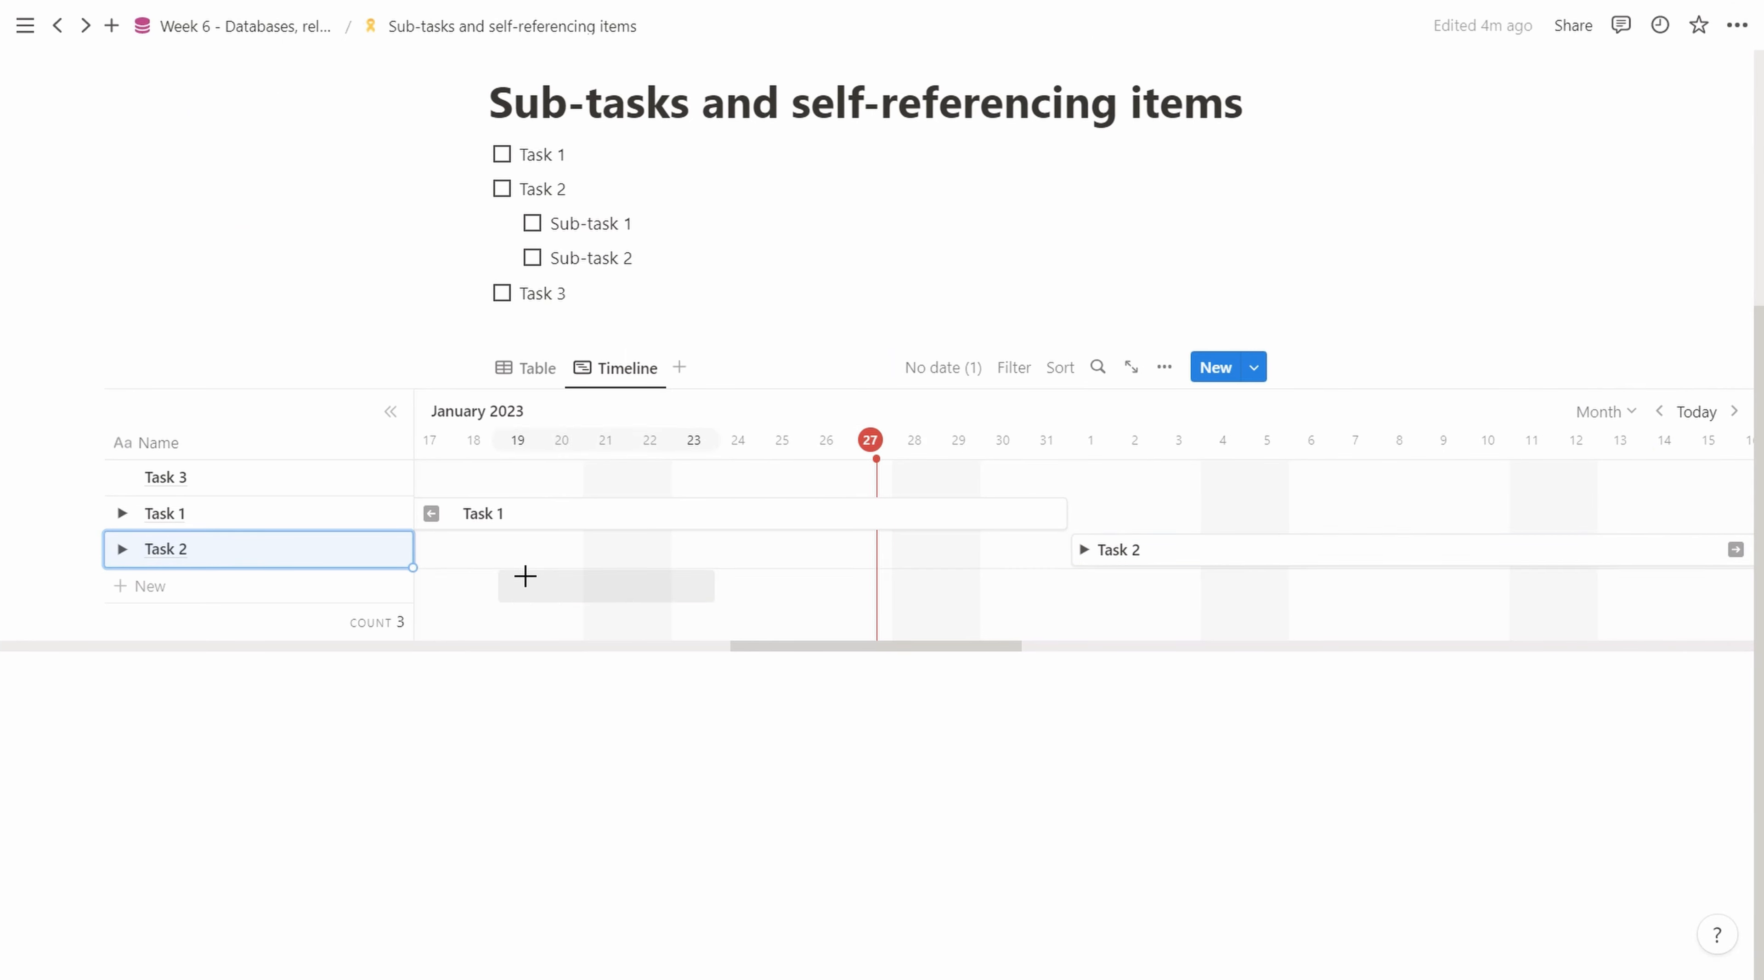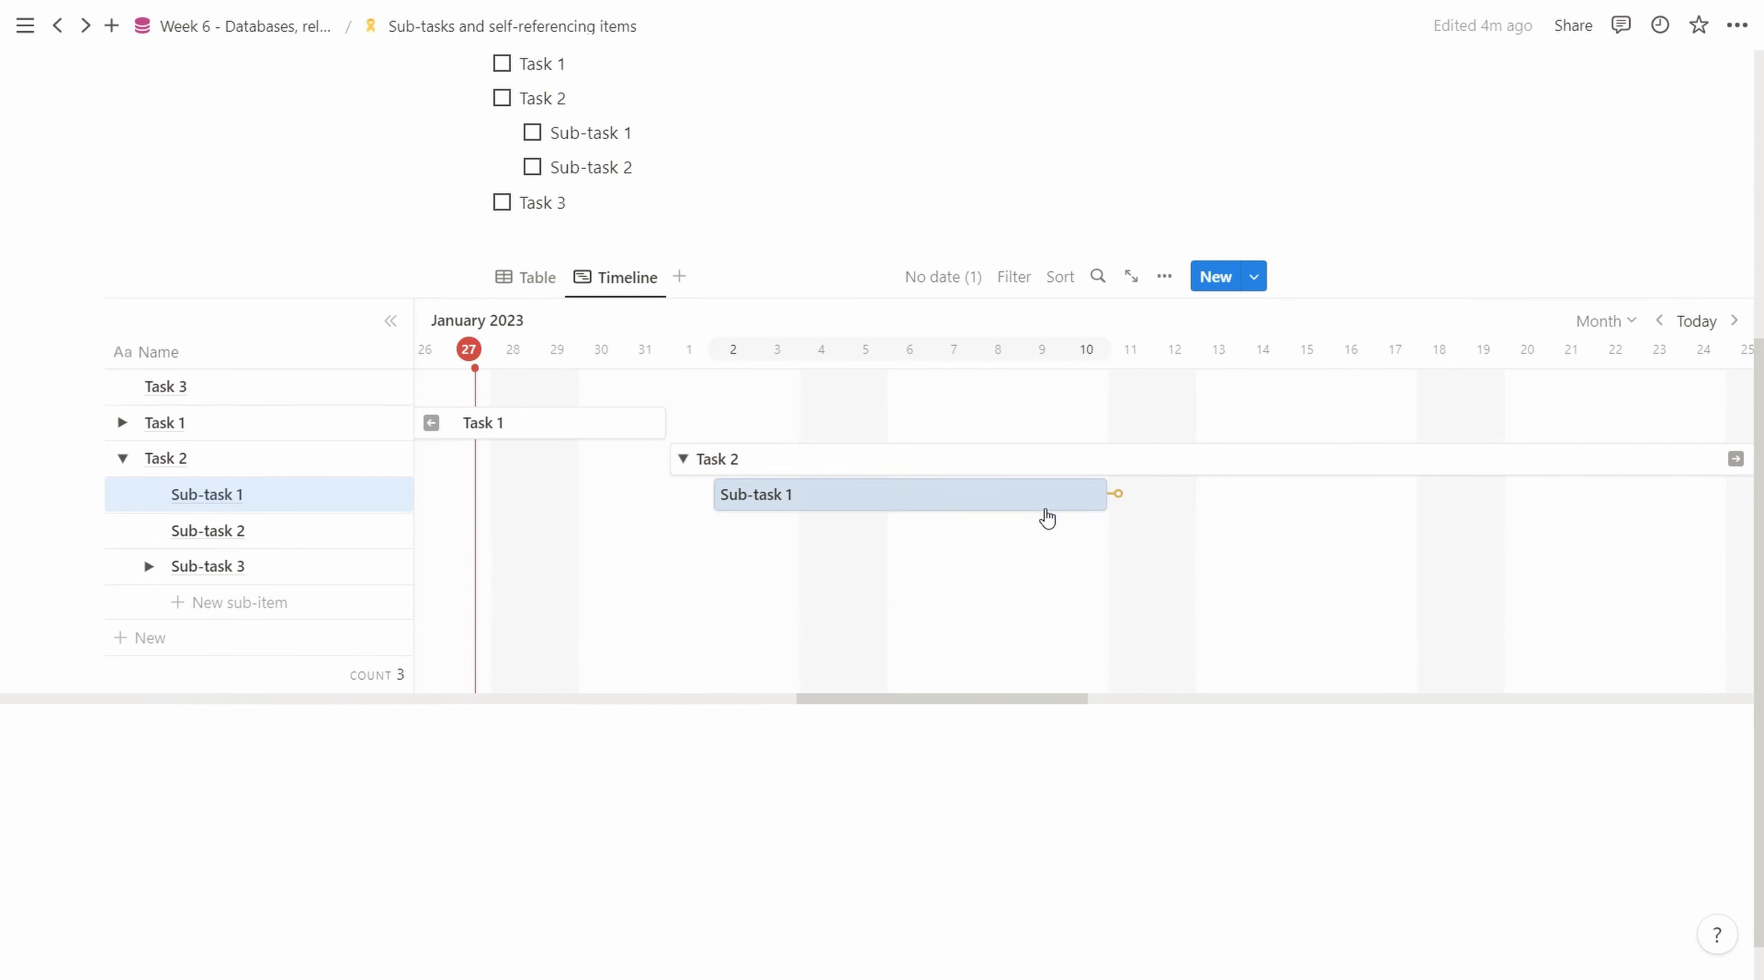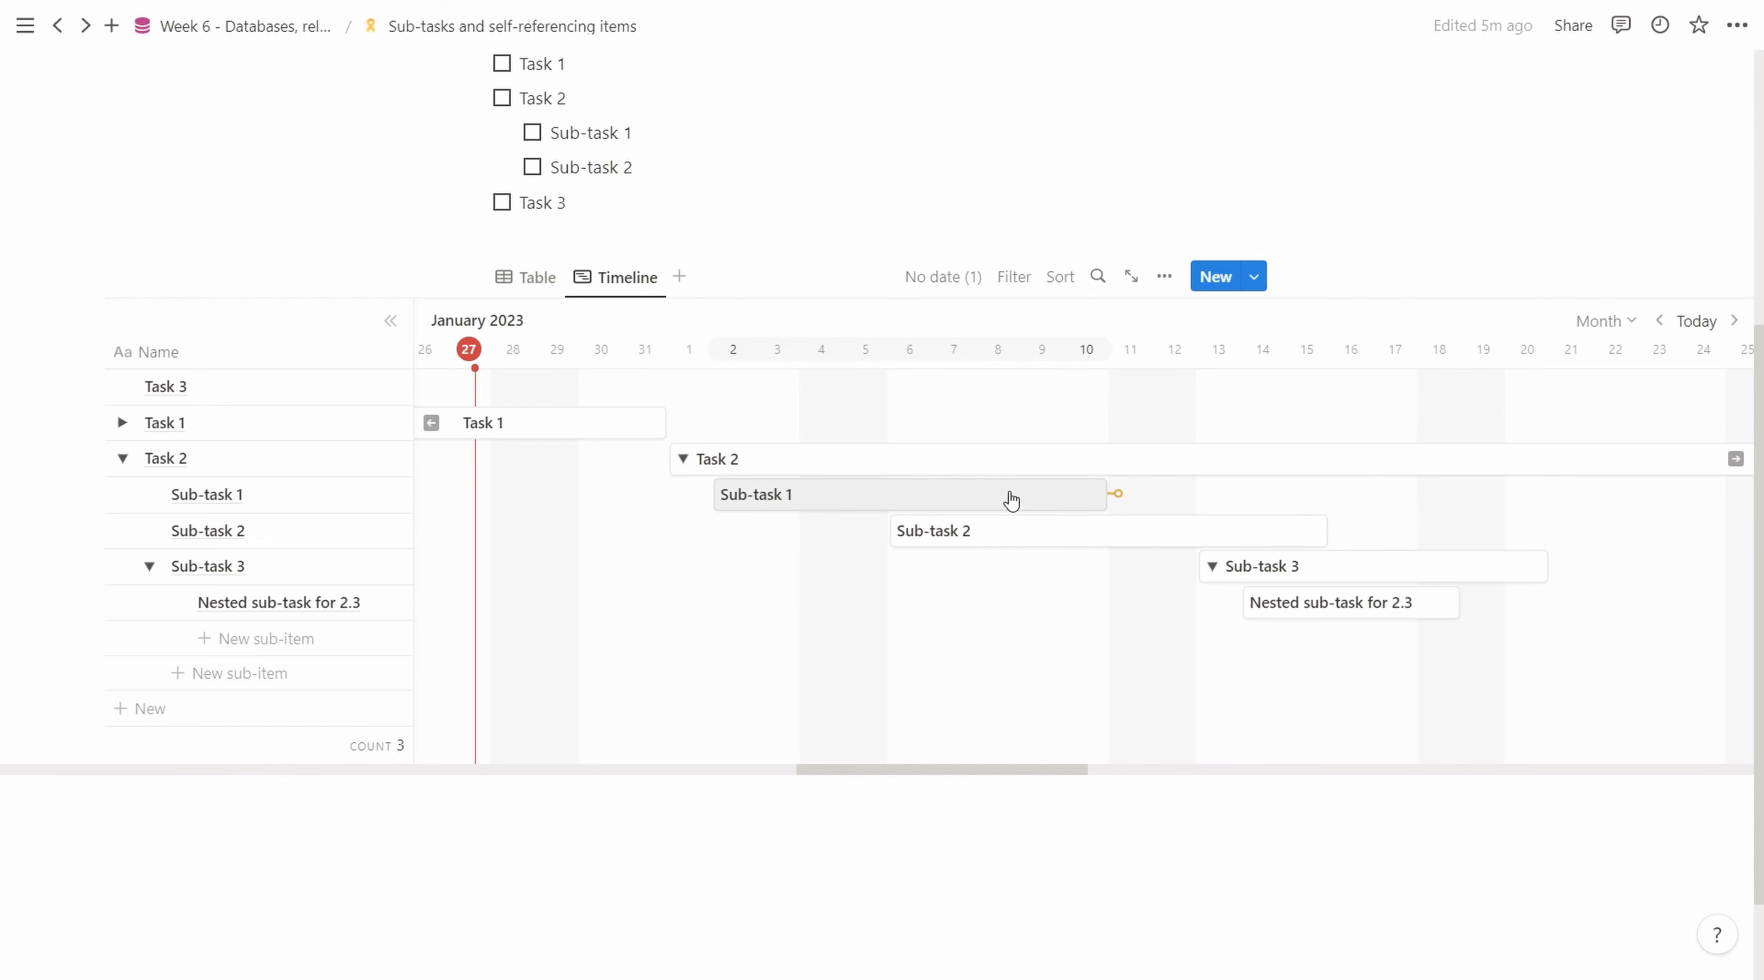We close this and task 2 shows up. We expand it and see the subtasks. We can start adding these subtasks using the graphics interface, a different way of adding date information. We have the subtasks here, and we can see the new nesting. We can add that on the timeline as well. The second thing you can see is a little extra handle showing up. We can click and drag to say subtask 2 depends on subtask 1, and subtask 3 depends on subtask 2.